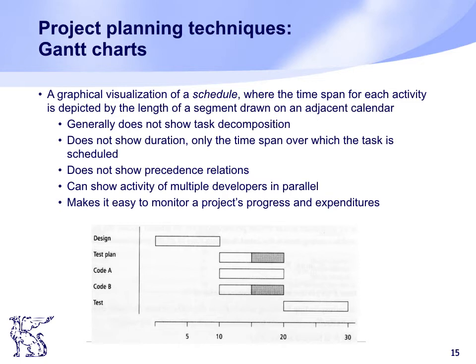On a Gantt chart, you can easily see the start date of the project, what the project tasks are, who is working on each task, when the tasks start and finish, and how long each task will take. And also you can see how the tasks group together, any overlap, or any link with each other, and you can also see the finish date of the project. So you can easily understand this is more helpful for project managers.